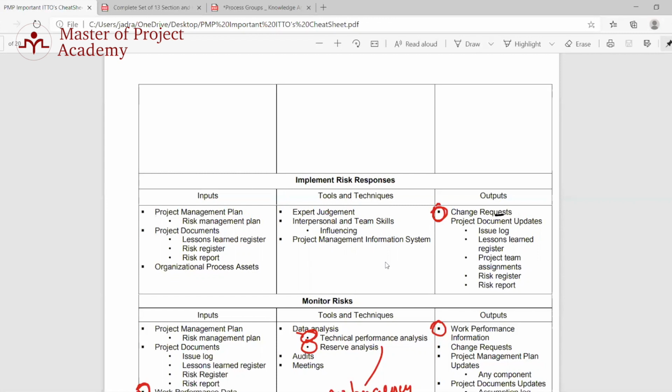But those 10 AC units will cost us an additional $10,000 to our project. So we need to submit a change request to change our budget. I see. Okay, that's well said.